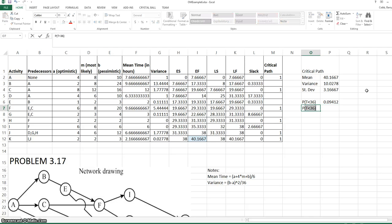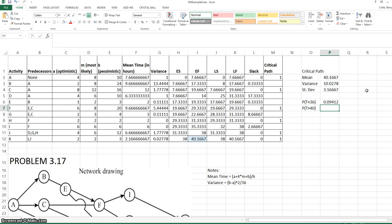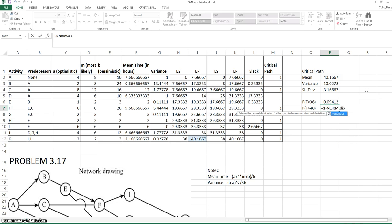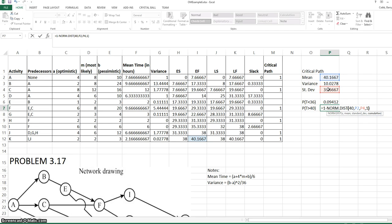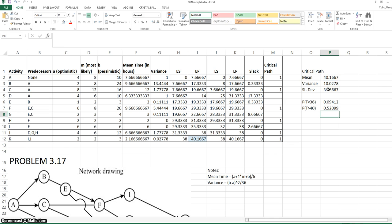If we wanted a right tail probability, say the probability that the project takes longer than 40 days, we would use 1 minus the NORMDIST function. Enter 40 as our value of interest, enter our mean, standard deviation, and cumulative. NORMDIST finds the probability of everything up to 40. But if we want the probability beyond that, we would subtract from 1. And that's 52%.